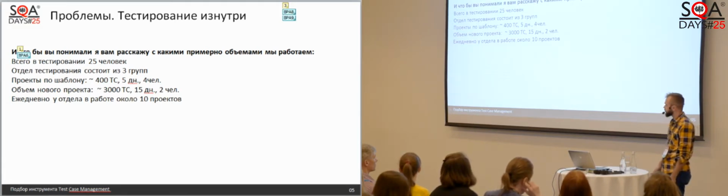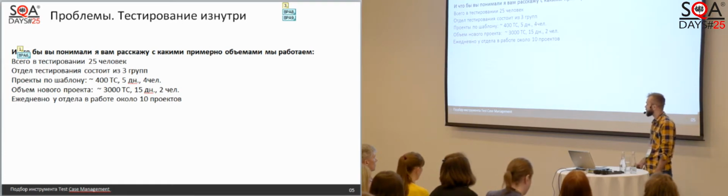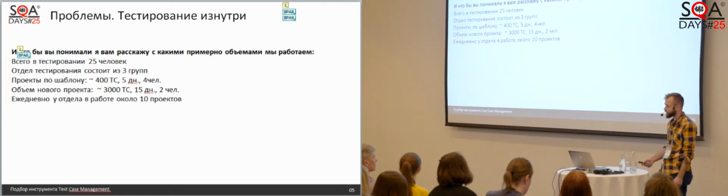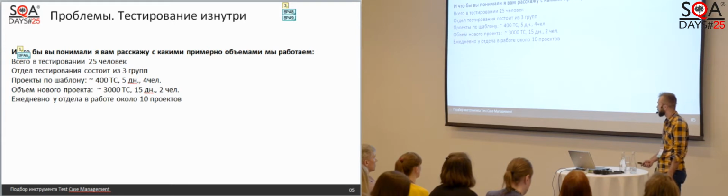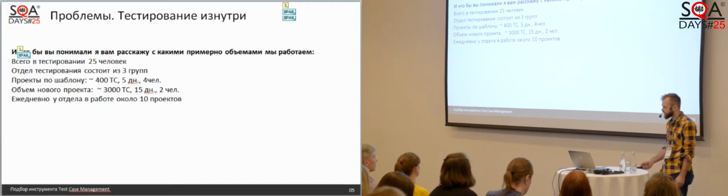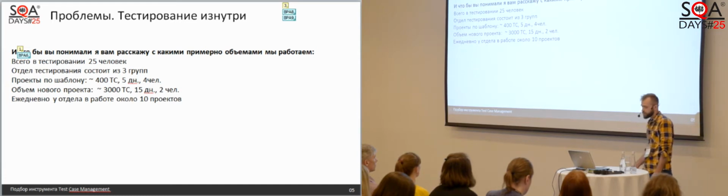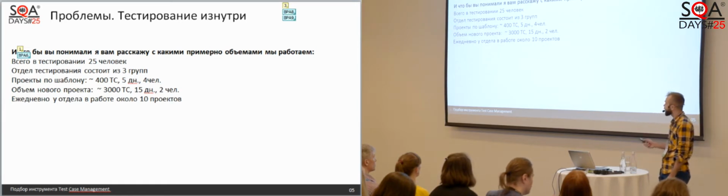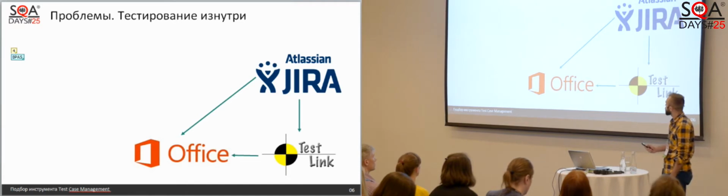There are 25 of us in a unit, and we're split into 3 teams. We have a template project, which we do in parallel, up to 400 test cases for 5 days by 4 people. And we also have new projects, up to 3,000 test cases for 15 days by 2 people.